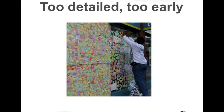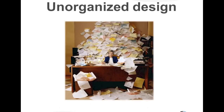Another thing I saw is that we had way too much information too early. There are documents everywhere, wiki pages and so on, and since there's so much information it makes all information worthless. It's not uncommon to say that the shotgun deals 14 damage at the early stage of a project. There's got to be a method to make sure you put details where they are needed right now, and avoid adding details to things that are far away in the future. We often had designs for things coming up in half a year's time while lacking designs for things just around the corner. The design team needs to be paving the road for development.